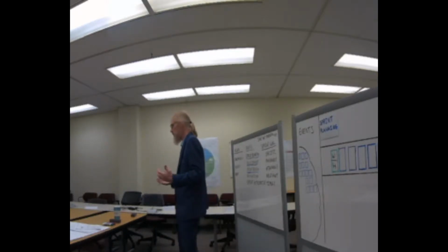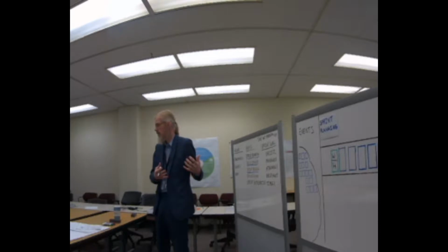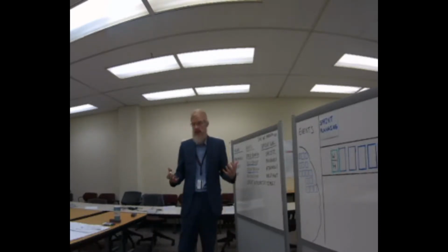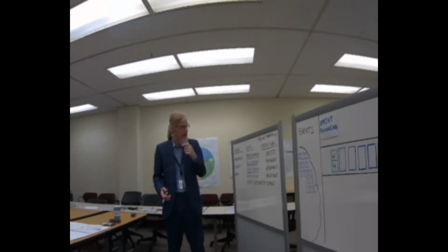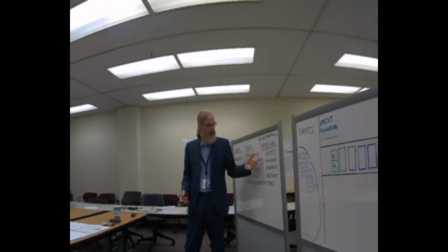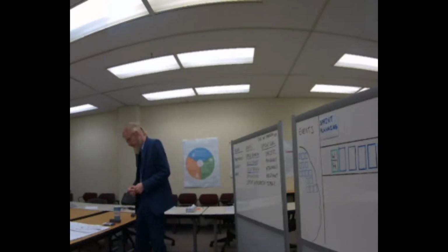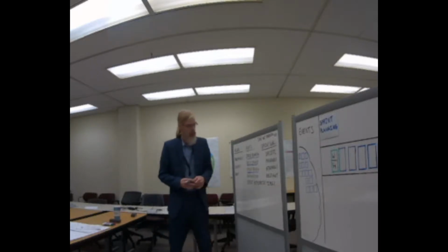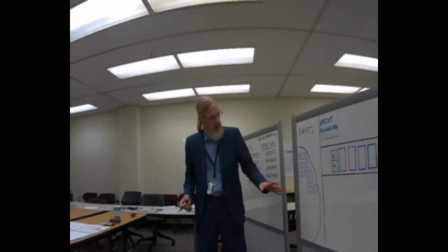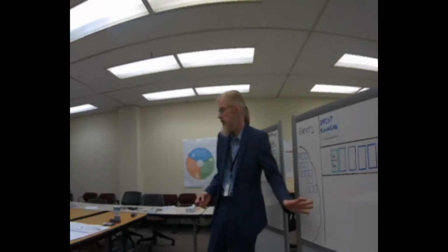We'll talk a little bit more about sprint goals. We'll see some examples when we get into the slides. But for now, understand that that is a deliverable of the what portion that is led by the product owner. And we like to say that sprint goals should be specific, measurable, attainable, relevant, and timely. We call them SMART. The second deliverable is to actually determine which of these features from the product backlog we are going to move into the sprint backlog and commit to as a part of this sprint. Those are the two deliverables as part of the what meeting.